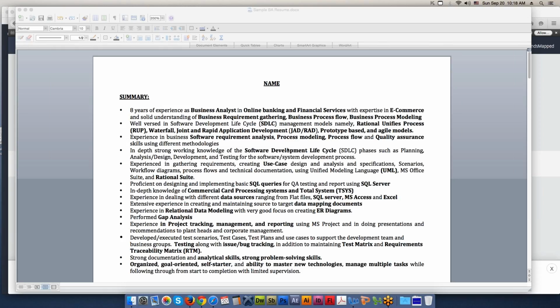Thereafter, I would start completing the BRD. Once I complete the BRD, I would start the functional requirements, have discussions with the developers, and after completing the functional requirements, I would pass the documentation to the developers, liaise with them, clarify their doubts, and then thereafter we would go to the QA.